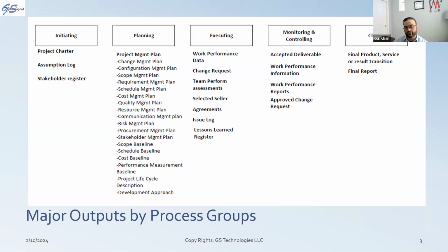The model of the change request, how we are doing a transformation and transitioning for the change, we will cover that as well today. But yes, you will create that change request. You have to go through that one, and that change request has impact on future documents you are producing, as well as the documents and artifacts you have already produced in the past. It may have a change in your assumptions, it might have a change in the stakeholder register, it may have a change in any of the planning phase documents you prepared.